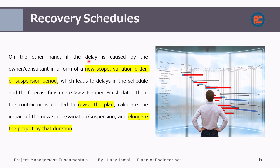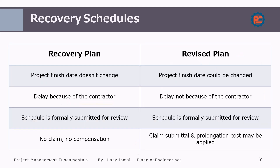On the other hand, if the delay is caused by the owner or the consultant — because of new scope of work, suspension period, or whatever — then you will do a revised plan, not a recovery plan. So before diving into the recovery schedule, let's see the differences between a recovery plan and a revised plan. In a recovery plan, the project finish date doesn't change — you are recovering delays and you would like to bring back the forecast finish date to the baseline finish date.